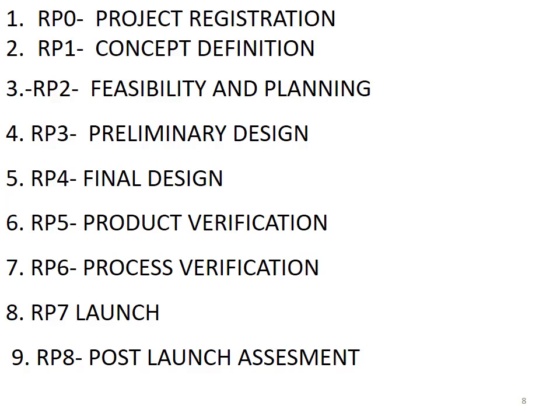Now we go for the next step, that is process verifications. Then demonstrate the process performance. So when we are making a beta prototype, then we can use the usual process by which we finally go for making the production of a particular product. So we have to demonstrate the process performance, complete field trials, finalize training plans.